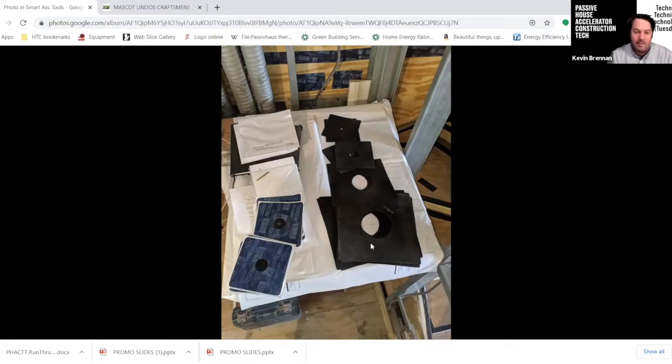So this is kind of like my go-to general contractor box of tricks that I explained to him. You can either hand out a $5 or $10 grommet, or you can pay one of us an hour, almost 2 hours, to clean and seal a penetration. Obviously, it's not an hour, but it could wind up being quite intensive when you're doing everything manually.